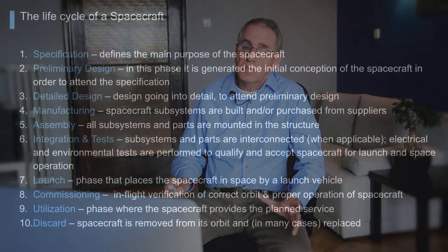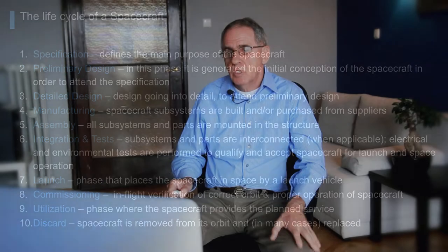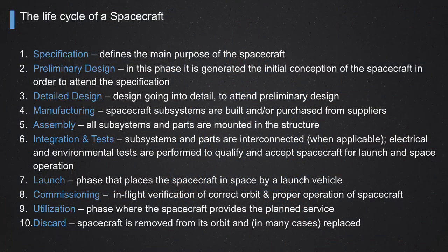The second phase is called preliminary design. After having the specification, we generate the initial conception of the spacecraft to meet that specification. Here we do a rough design: what are going to be the main parts of the spacecraft, roughly - the geometry, the size, roughly the size of the solar arrays. The main parts of the spacecraft, but not in detail yet. Just the preliminary design.